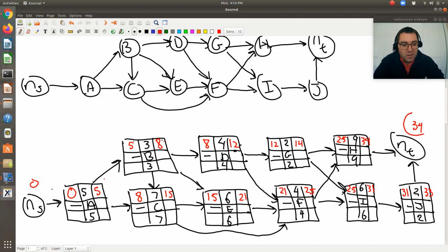Bam. So the time it takes to take this project to completion is going to be 34 weeks. Now we need to go backwards. So let's do this.